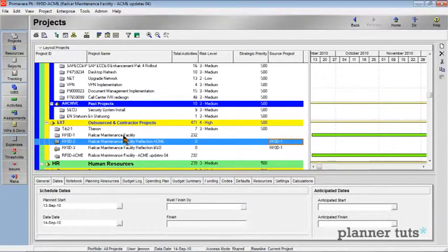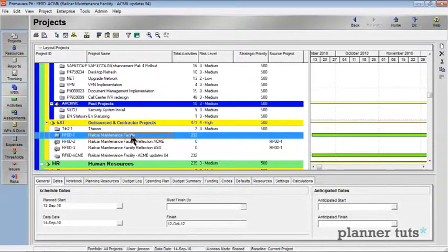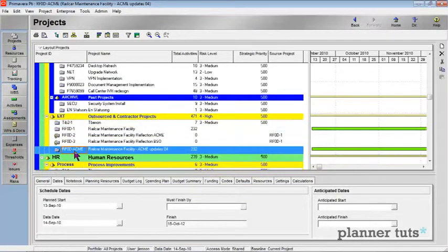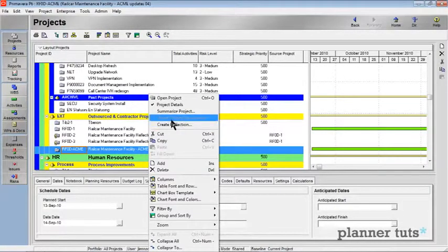If you send this XER without creating a reflection project over to your subcontractor and they update it and bring it back, now we don't have the ability to do the merge. For example, look at this project. This is one that came back from Acme, and notice it has no source project linked to it. So I can't do that merge functionality. The option doesn't show up.